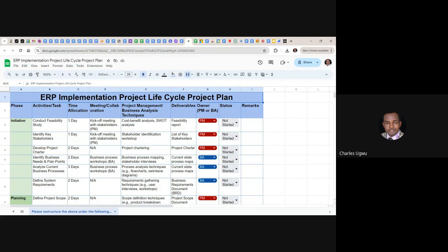But the breakdown structure does not come at the time of breaking them down. You don't need to put time. Time is a resource, and money is a resource. So at this point, there are no resources allocated to a breakdown structure. It's just a skeleton or a scaffold of the project, which is a blueprint. So a breakdown structure becomes a foundation where you lay your project plan.